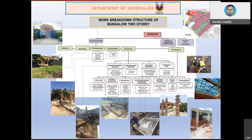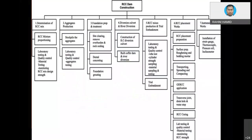Here is a bungalow project example: it consists of site clearing, securing, preliminary works, fabricating work, substructure, etc. — substructure could have many more sub-activities than superstructure. And for an RCC dam construction, whatever the project, you can always divide into smaller portions so that you can easily track progress.